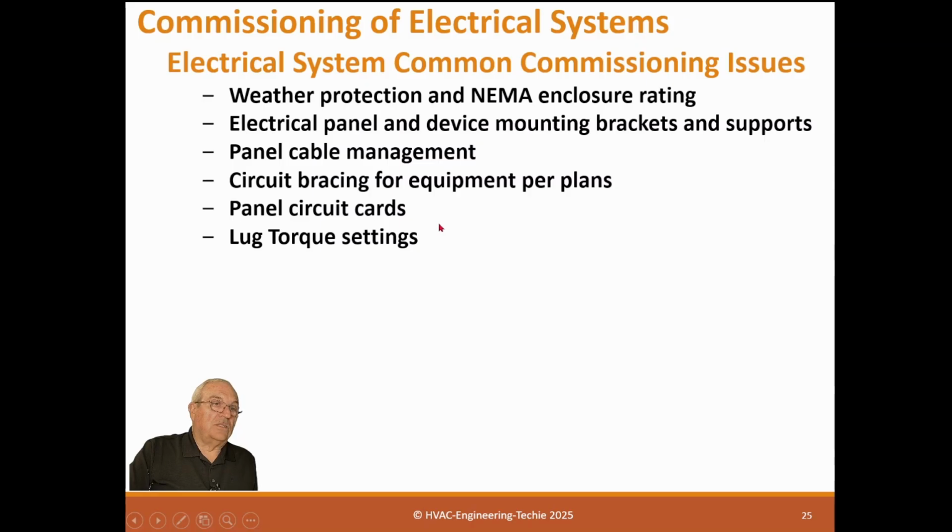Local lug torque settings have been done correctly. I remember the way they do a lug torque is they take a felt tip and mark across the nut and the bolt, so you can tell it hasn't been moved. And it also tells you it's been tested.